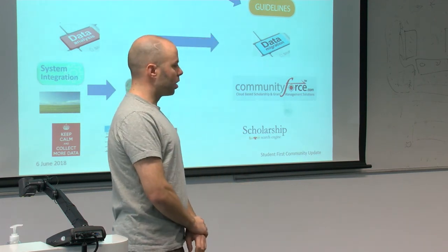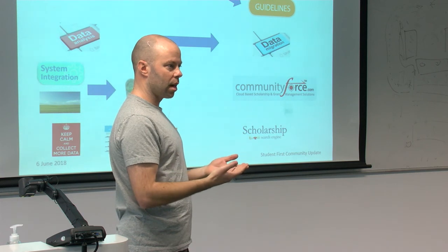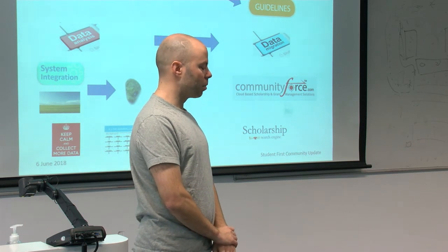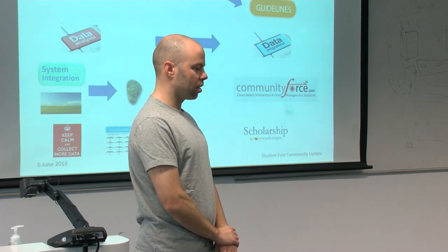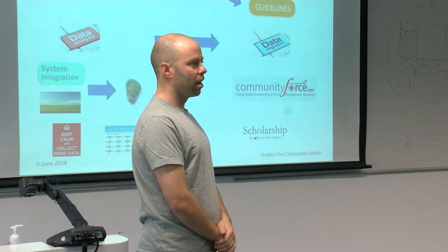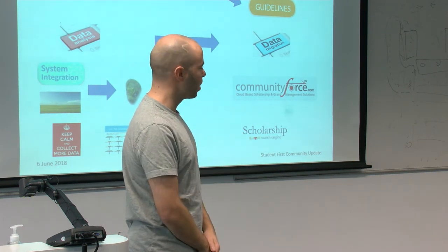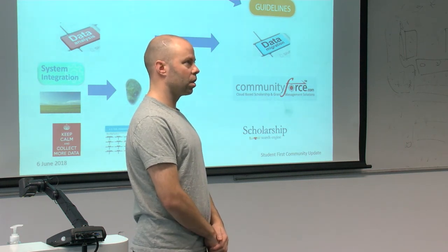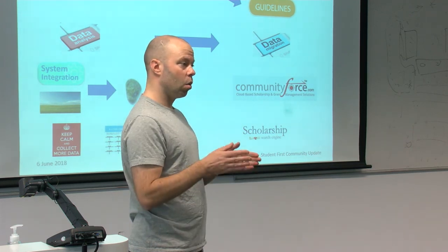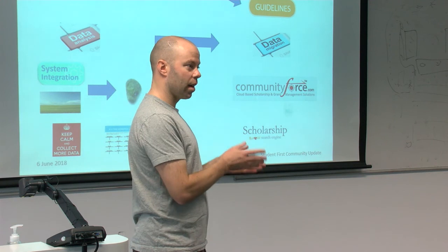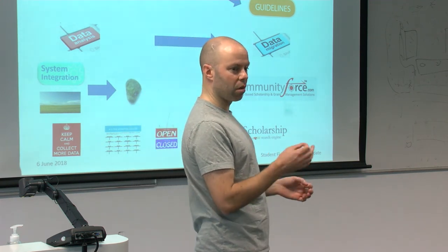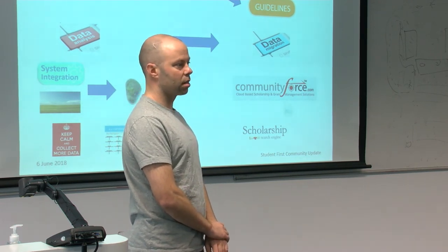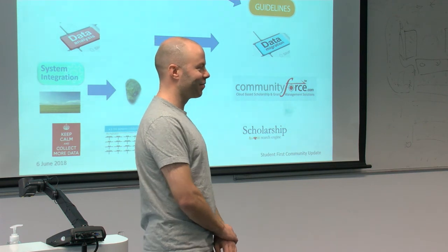And smoke testing essentially is putting everything into production. There could be other descriptions of smoke testing, but it's putting it into production and doing a mini go-live, but not officially publishing that fact. It de-risks things because there are some things you can test in the test environment, but all the environments we use are different and configurations could change. Someone could forget to do something in one environment, so it's further de-risking the release process. So I think I've covered it.